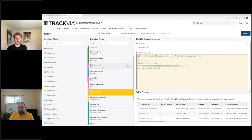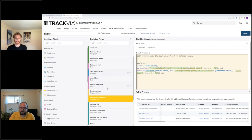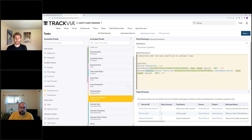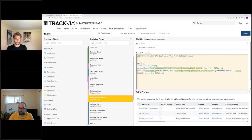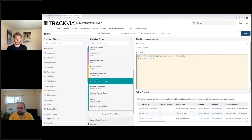The 'presumed completion' uses basically the same formula, except the middle section adds the task length to the max clear date — so if the task length is three days, completion is three days after the clear date. We handle the scenario where someone put in an actual start but not an actual completion. Finally, we have a calendar start field, which converts the triggered text back into a calculated date field, since we need a date type for the calendar view and triggered fields can only generate text.